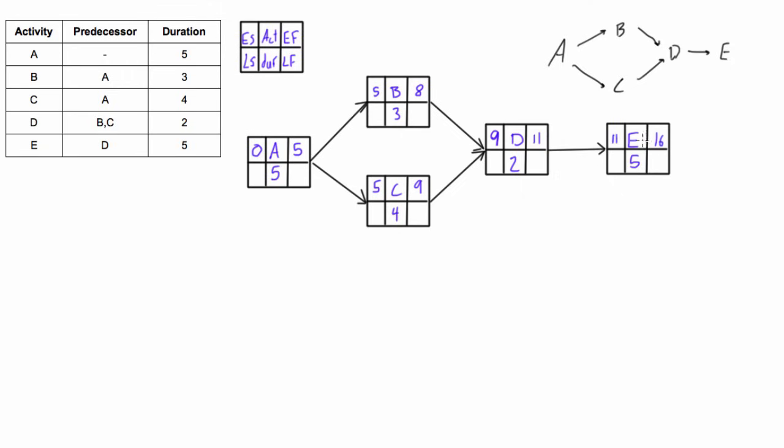Now we want to find the late start and the late finish, so we'll do that with the backwards pass. So we bring the early finish down on the last activity to the late finish and write it there. And then we just go through and we subtract the duration, so 16 minus 5 is 11. Now we bring the late start to the late finish of the preceding activity, so we have 11 and we subtract 2 and we get 9.